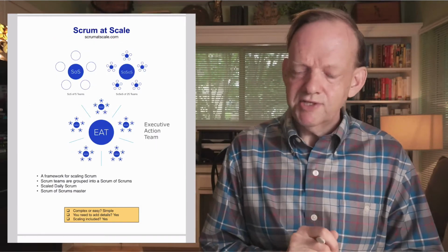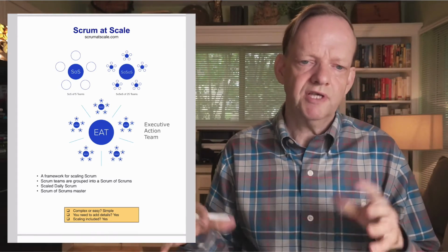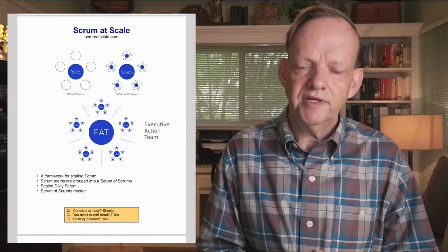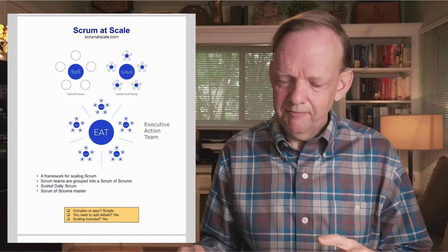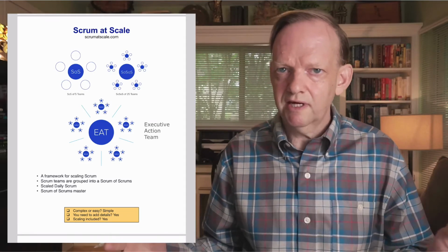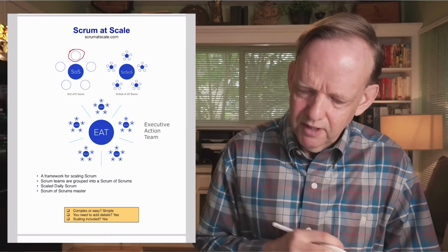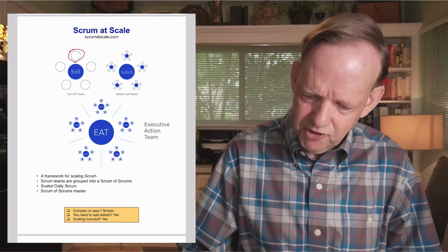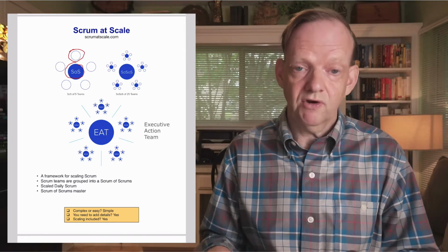The next one is Scrum at Scale. And so Scrum at Scale is basically Jeff Sutherland and colleagues that did Scrum. And what they're doing is taking the Scrum methodology and basically reapplying it to a larger scale project. So basically here we have our Scrum team, and this is our Scrum of Scrums. So basically we apply Scrum again to the collection of projects to coordinate them.